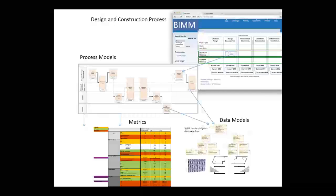So I'm going to give you a very specific example in a minute, but we're looking at the handoffs of information from, say, a masonry distributor to an architect, and then how that masonry distributor communicates with a given masonry manufacturer about whether a certain product is available, and, for example, what is the minimum order quantity and lead time for that material. So that's a flow of information that currently today is ad hoc and person to person.